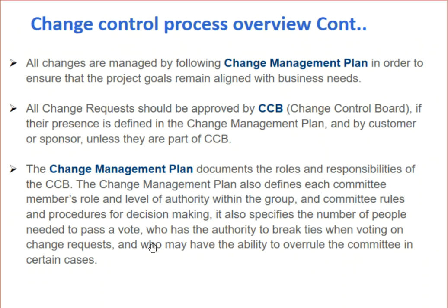All changes are managed by following change management plan in order to ensure that the project goals remain aligned with the business needs. All change requests should be approved by the change control board if their presence is defined in the change management plan, and by the customer or sponsor unless they are part of CCB. All the details about the change control board are mentioned in the change management plan. So we will be following the process mentioned in the change management plan.